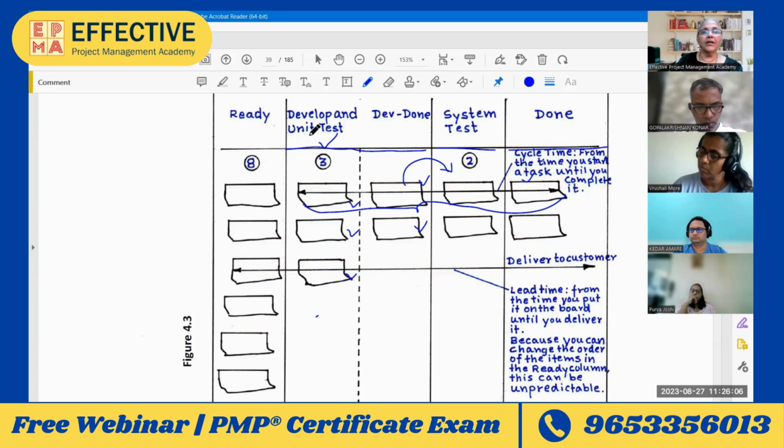So this is what the WIP limit is. Let the team decide how many stories they want to take. The team decides that they can take up a maximum of 3 stories at a time. So a maximum of 3 stories on the board is what their equation should be. Ideally, I would put a number here, a WIP limit here, 2.